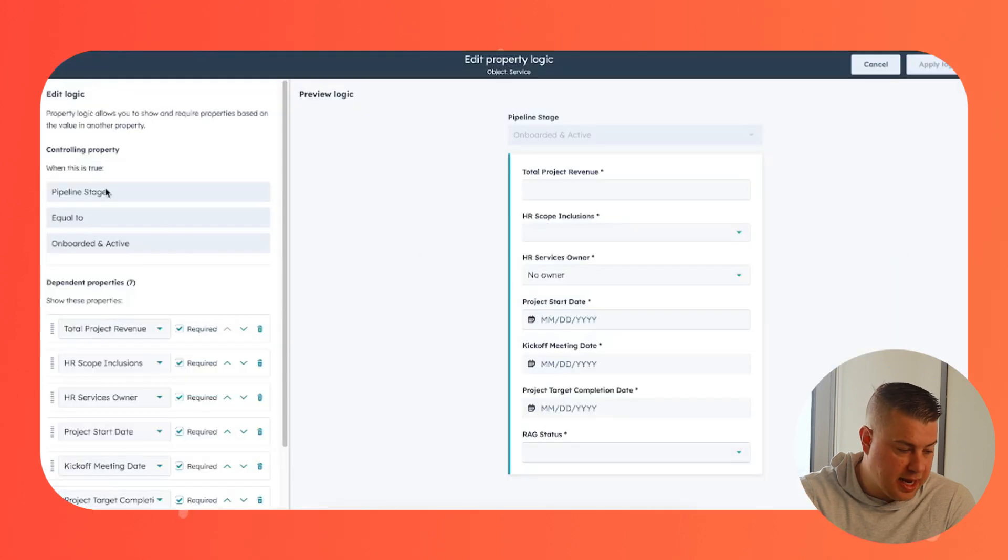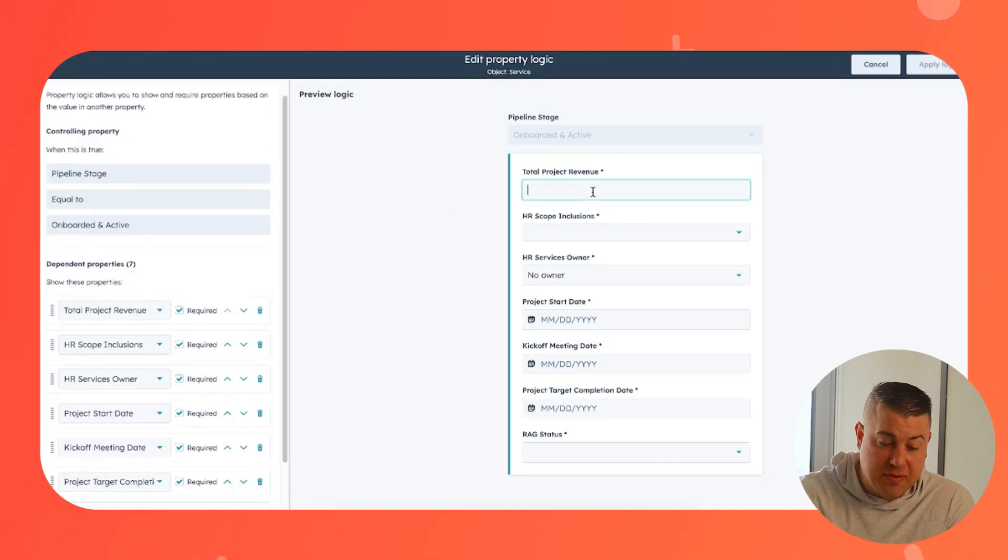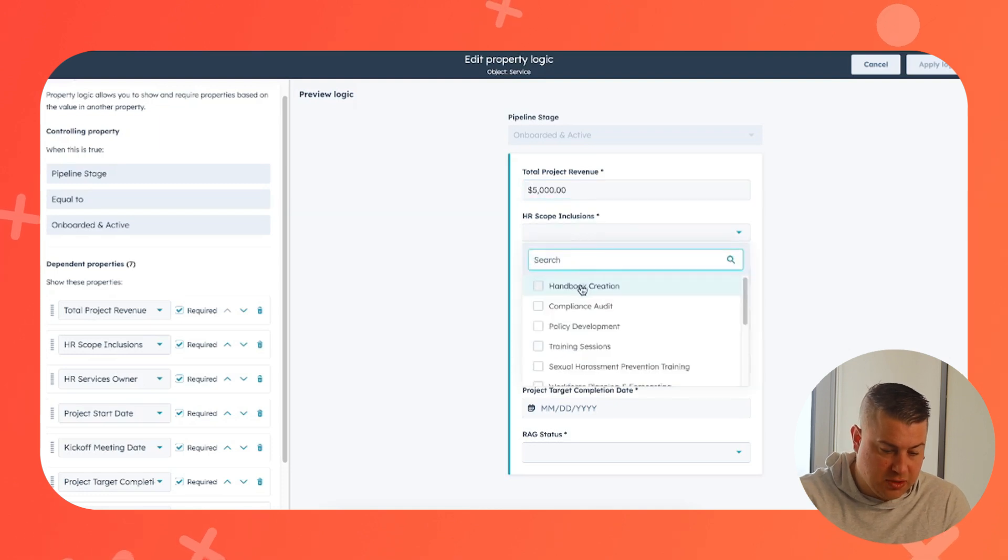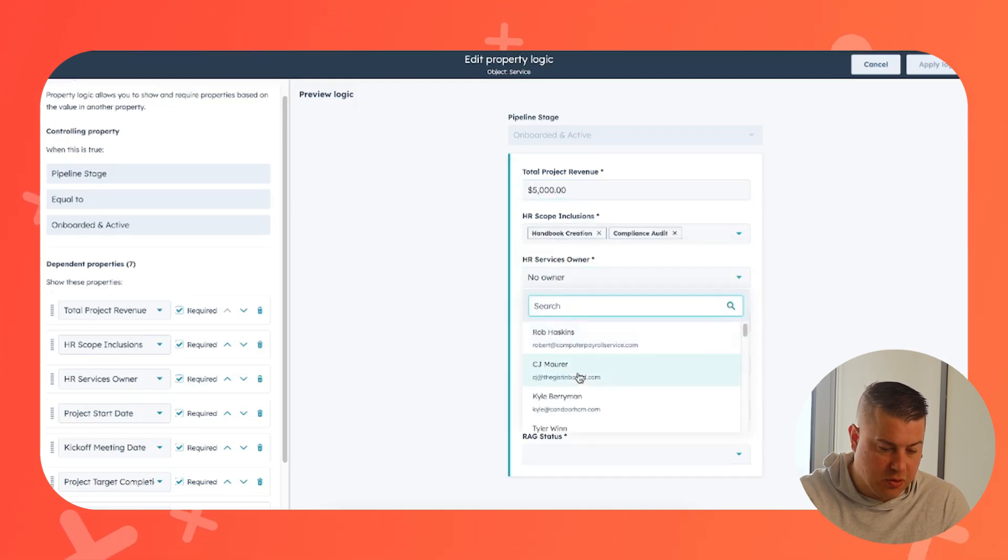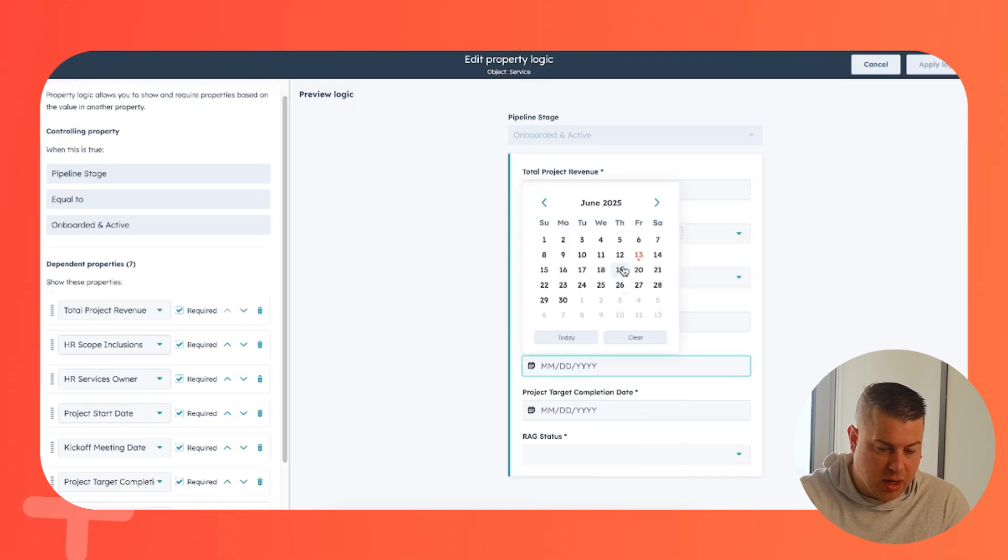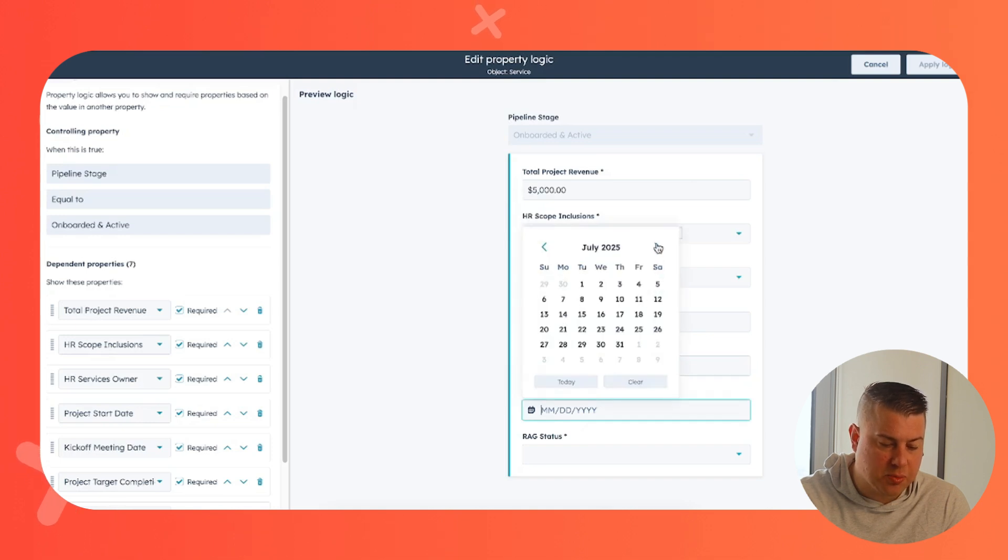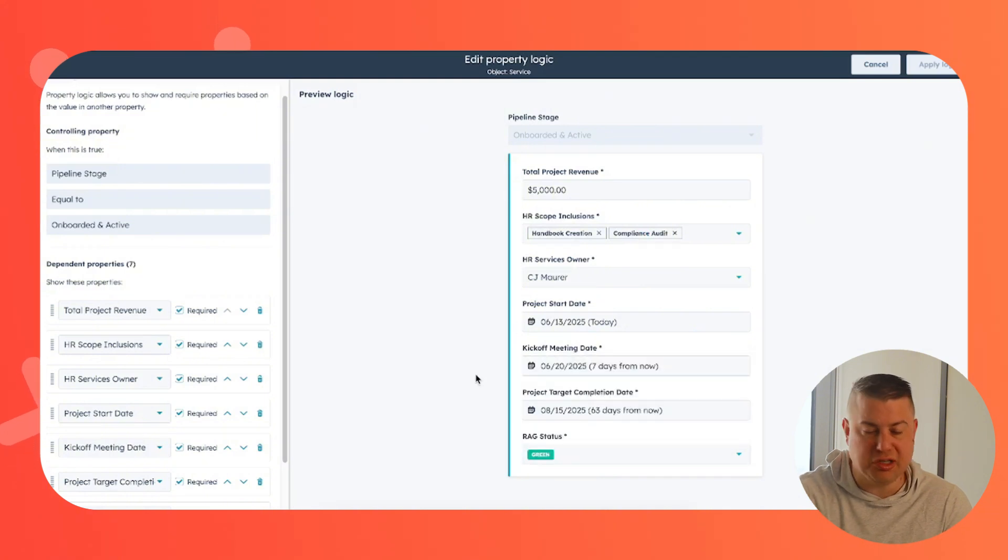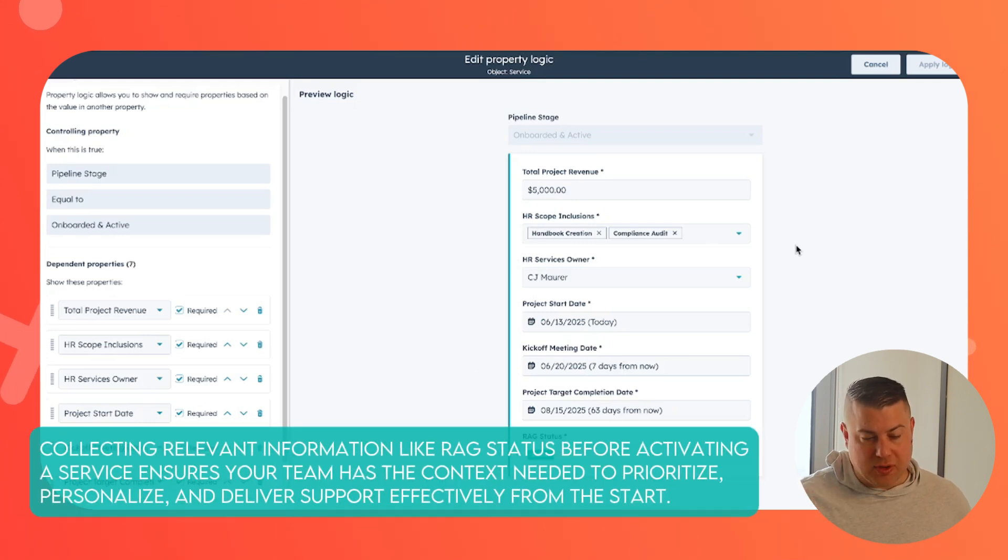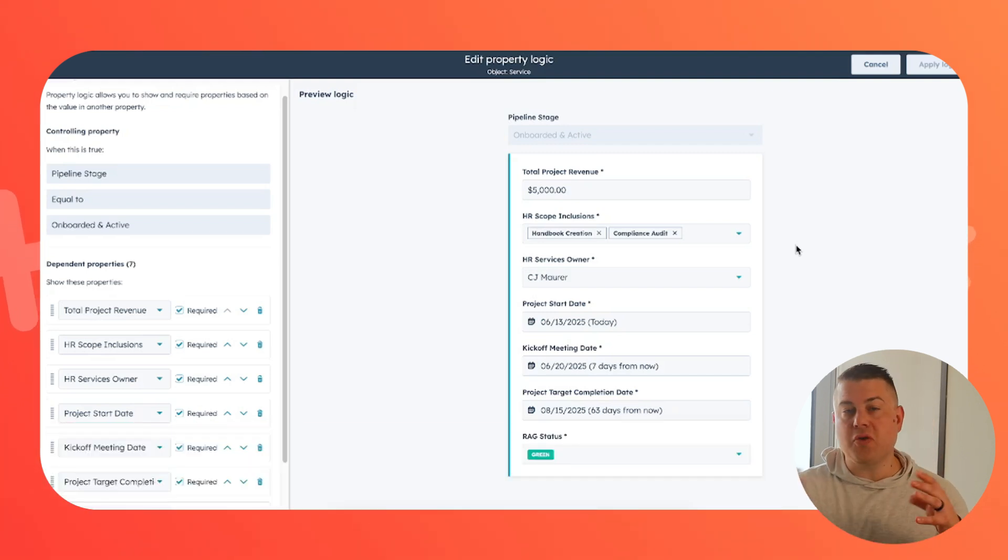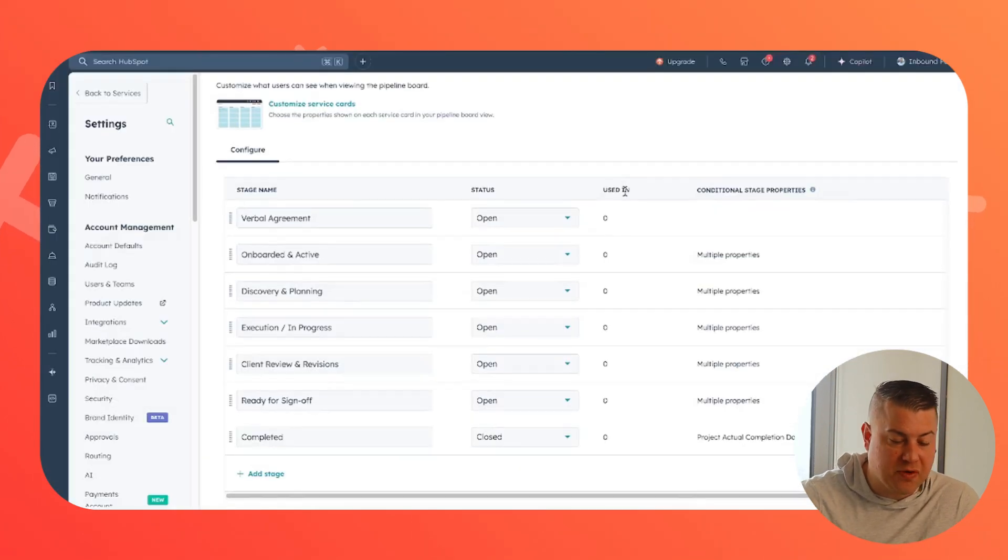So let's look at this. What this is showing is that in order to move the service in the HR projects pipeline to onboard and active, there's information that you have to capture. So what's the total revenue? Five thousand. What are we doing? Handbook creation and compliance audit. Who is the owner of the service? When does this start? When was the kickoff meeting? When's our target completion date? And how is the client sentiment? Red, amber, green. Is it good, is it okay, or is it bad? So now what you've done is you made it so there's no way we can activate a service without capturing this relevant information. And if you've ever watched our videos on deal pipeline optimization, you know this is critical because now you can report on all of the different elements that are relevant to the services that you're providing.